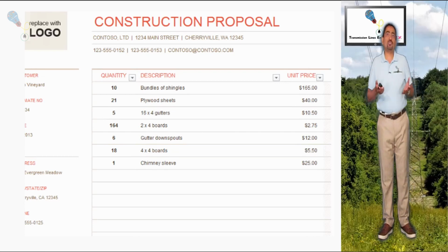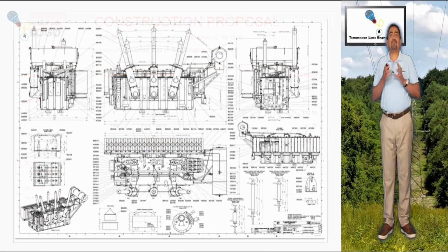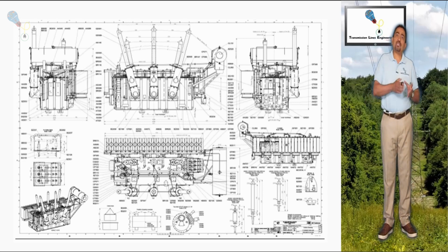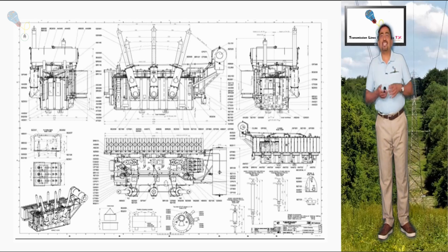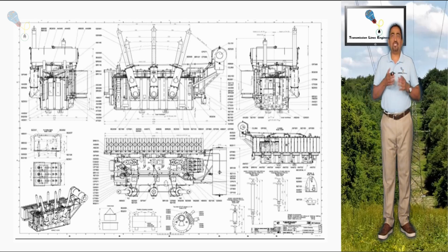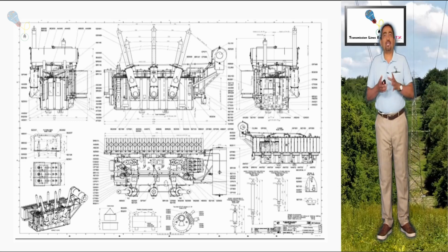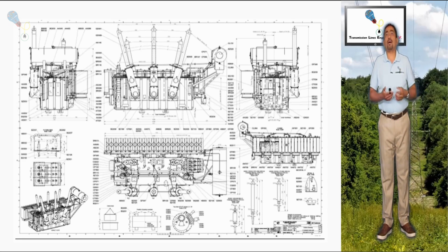Something very important to mention here, and as a recommendation to our buyer colleagues, is the fact that the purchasing area must request the technical sheets for each material offer, including dimensions, weights, employed materials, and manufacturing specifications, since this is key information for the engineering team to be able to carry out a proper technical evaluation of the materials quoted. Otherwise, there is a risk of accepting materials that are not completely suitable for our needs.